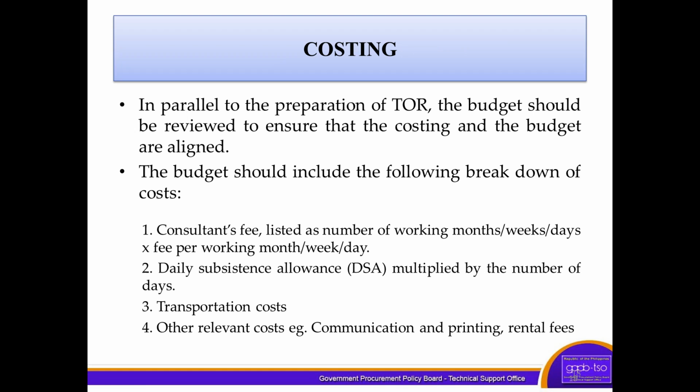So moving on to costing, because costing would be part of the terms of reference. In parallel to the preparation of the terms of reference, the budget should be reviewed to ensure that the costing and the budget are aligned. That is a basic requirement, the alignment of the budget and the costing, because what you specify in the TOR is what you expect to pay. And then the budget should include the following breakdown of costs.